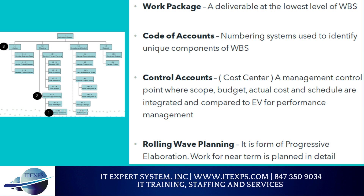How to get there — there's a technique the project manager can use, among others, called rolling wave planning. It's a form of progressive elaboration. This is a very popular way to basically keep coming back over and over again to your scope, your requirements, and your WBS, adding more and more detail as it becomes known. When you first start out, you will only have a high-level view, but as you get deeper and deeper, you can refine and make your work breakdown structure and the entirety of your requirements and scope complete, using what we call rolling wave planning.